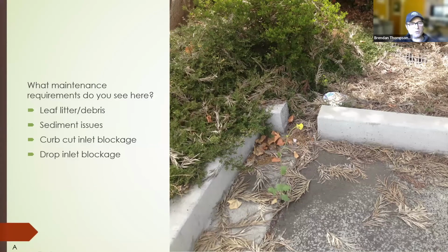putting in a permeable gutter pan where water infiltrates through the pervious pavement and then goes underground into the bioretention unit. And what we're finding based on experiences from the municipalities is that these permeable gutter pans inevitably fail. So we are not wanting to see those anymore.